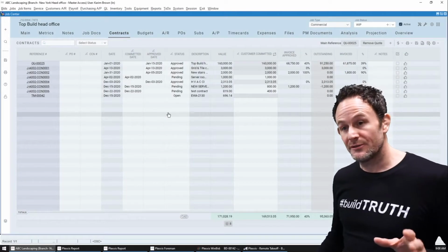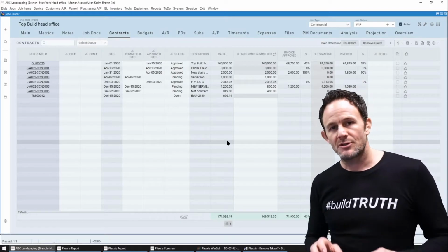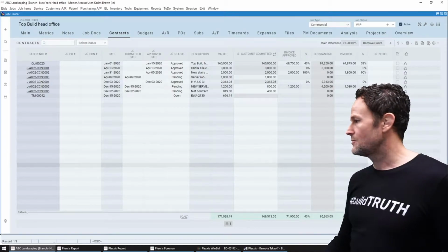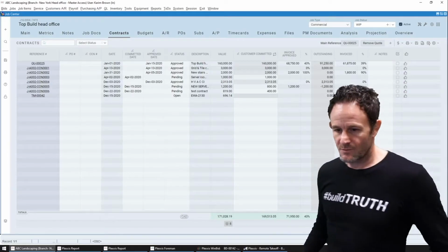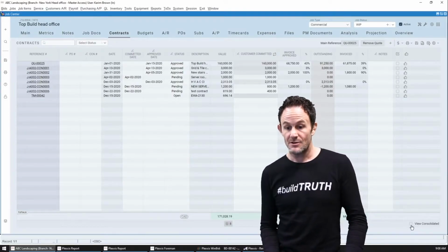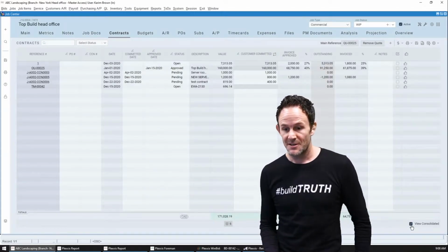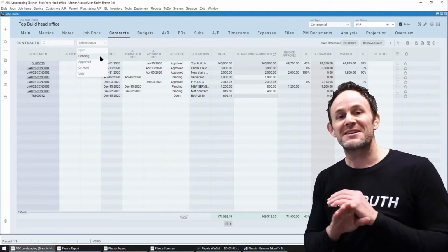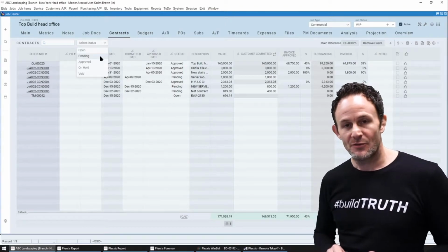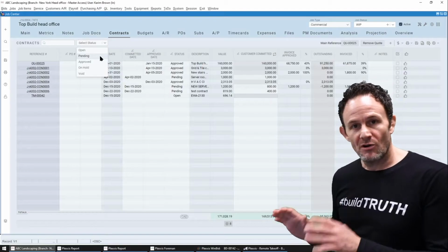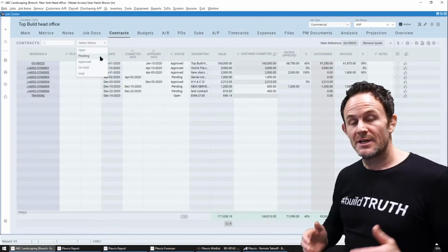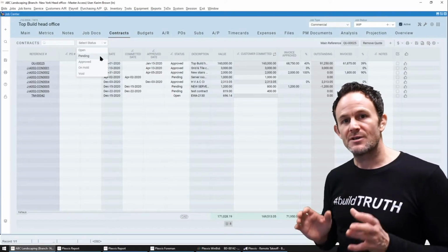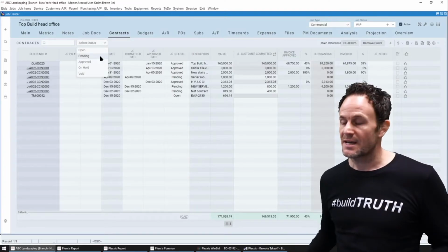Okay, so a couple cool little nuggets here for you. One, you can add multiple change orders or T&Ms or extra work order tickets to a single change order. And if I want to view that in a consolidated fashion, actually I gotta do some weatherman work here. So move out of the way, and right here, you just click this button right here, boom, consolidated. So let's unclick that. Now, another thing that's cool, you don't need Excel at all, period, for change order workflows. We manage all status levels from ideation to approval inside of Plexxis, so accounting has full visibility to every single change order, regardless of the status.